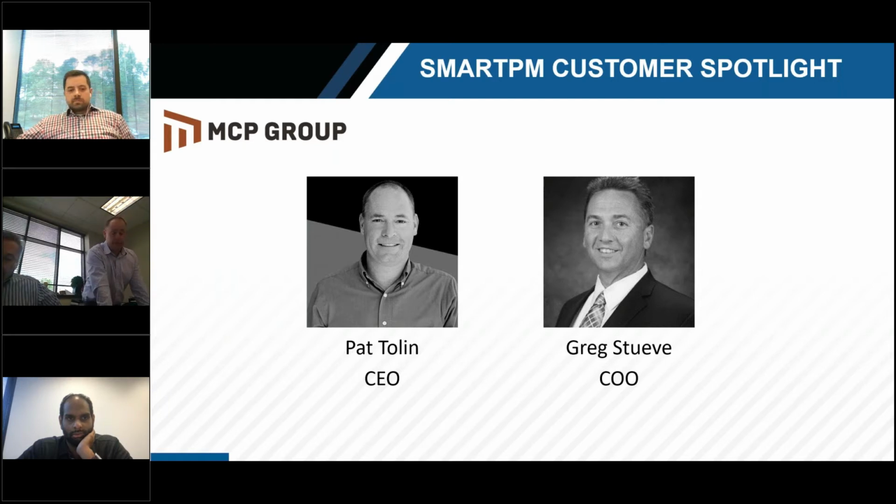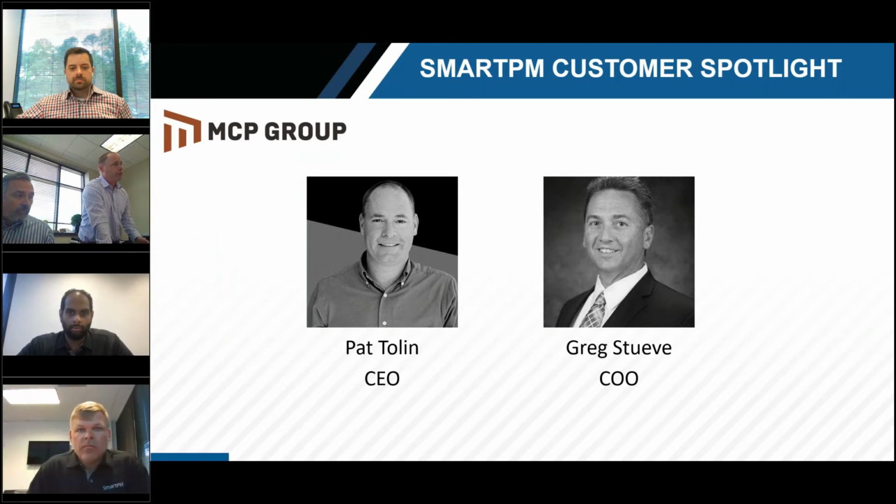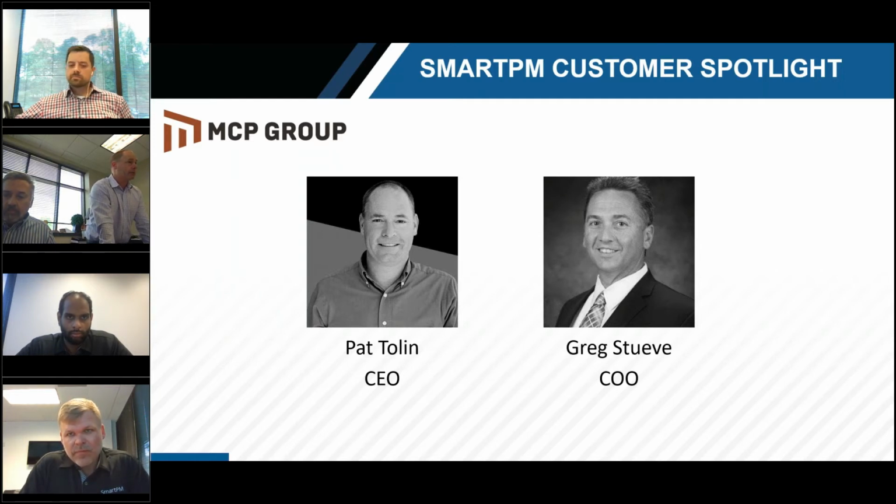Well, it was really a review of our mid-year numbers on some projects that had finished up in the first quarter, second quarter of 2020, and the margins were looking not great. It's not that we lost subcontractors or switched superintendents or something like that. It was that we didn't get the jobs done on time, and our labor costs were over and our general conditions were over. And so that really sparked us to just focus on schedule, period. But again, we didn't really know what that meant or how to start, and it's taken several months to understand that. But that really started as we were losing money because we weren't getting jobs done on time.